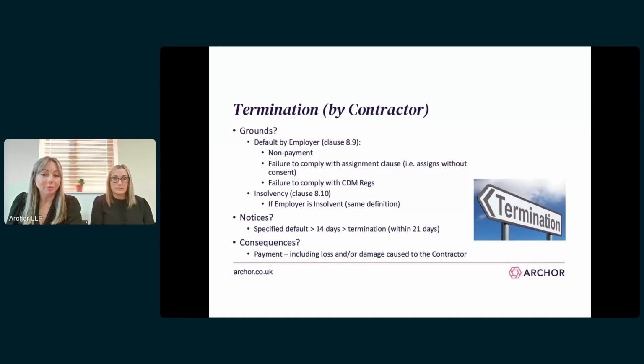And if the contractor terminates off the back of a rumour before the employer has entered into insolvency, then it's going to be the contractor that's in breach. So on the giving of the notices, the periods are the same. A specified default notice first, and then if the default is not remedied within 14 days, the contractor can serve a notice of termination on the employer. Again, with insolvency, however, this just takes place upon service of the notice.